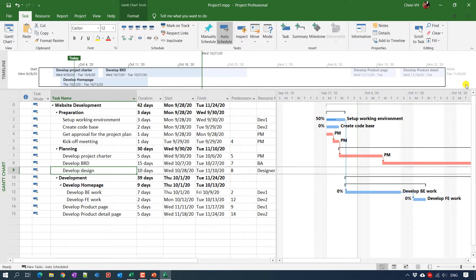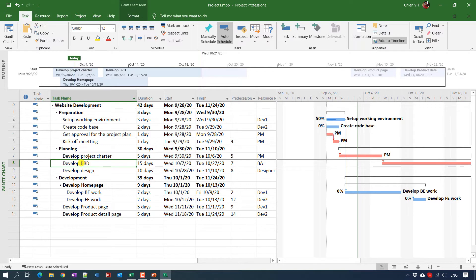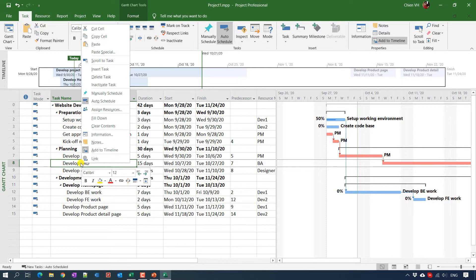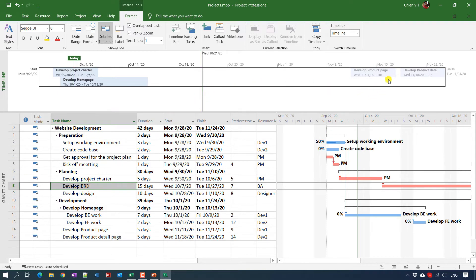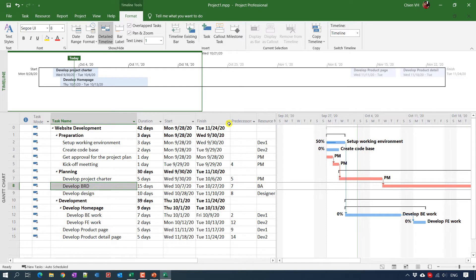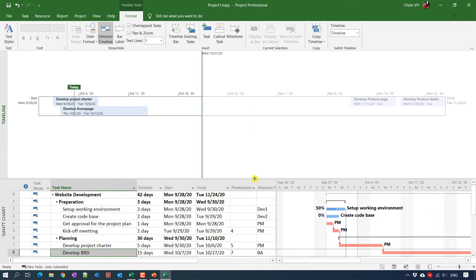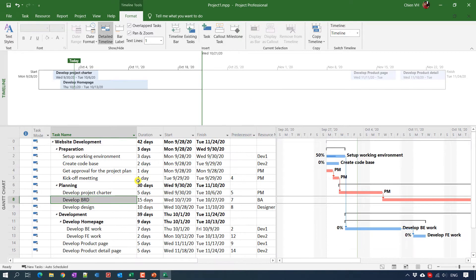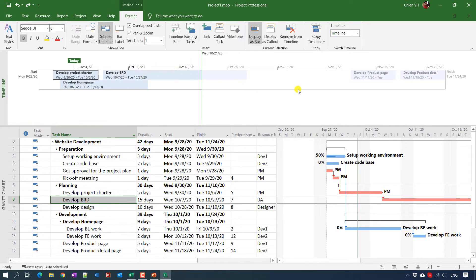In the timeline, you just go ahead to add some of the milestone or primary key milestone in your project. So for example, you have the task Develop BID, if this one is milestone in your project. You just go ahead to right click on this one and click on add to timeline. The background Develop BID homepage. It's too long so. This one, actually it's already added into the project timeline before.